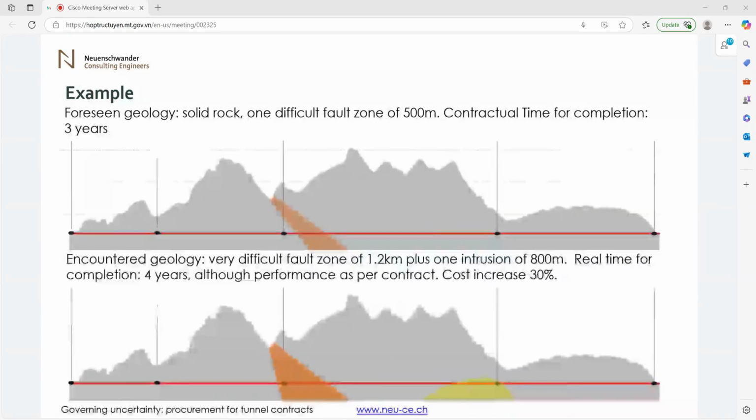So you cannot take a cost increase risk of 30%. This is something that cannot be taken, which means that in this case, the risk of the contractor walking away, of the contractor going bankrupt, or at least of extremely costly disputes will be extremely high. So we should do something about that. Next, please.